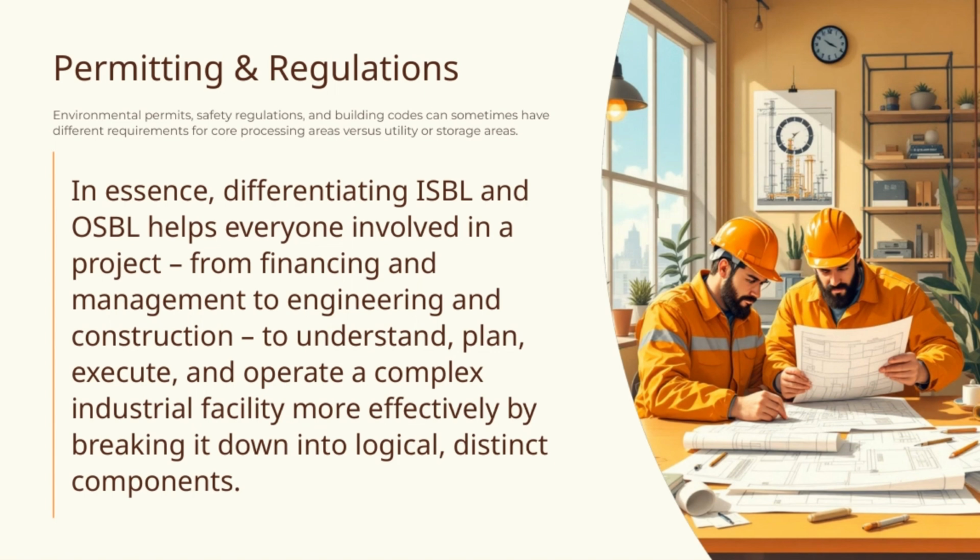Understanding the difference between ISBL, or inside battery limits, and OSBL, outside battery limits, helps everyone involved, from financiers and management to engineers and construction teams, to communicate clearly and work more efficiently. By breaking the project down into these logical, distinct components, we make the complex more manageable.